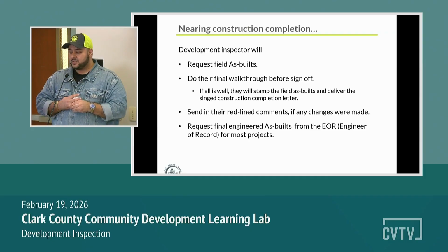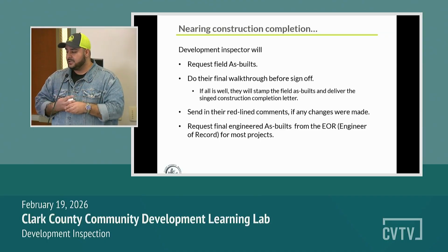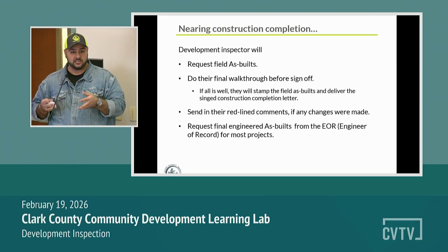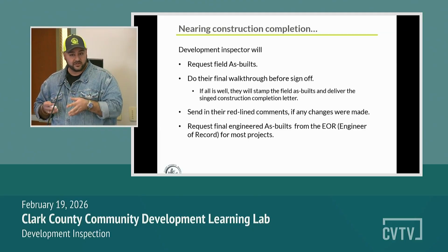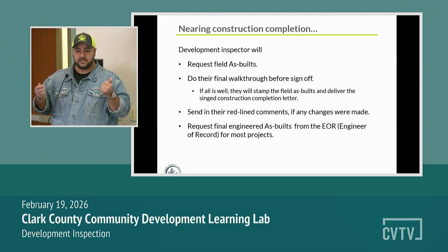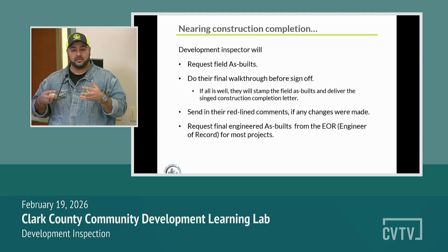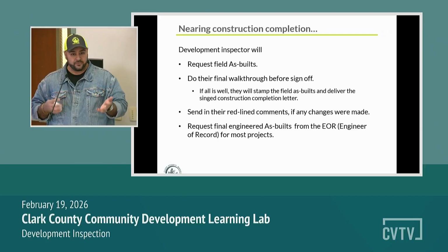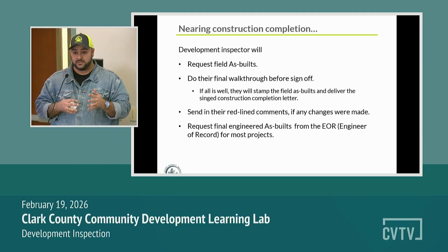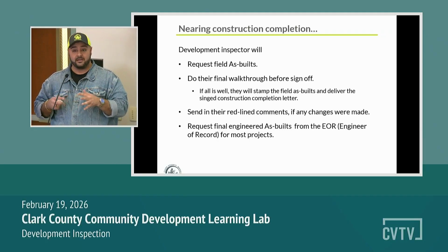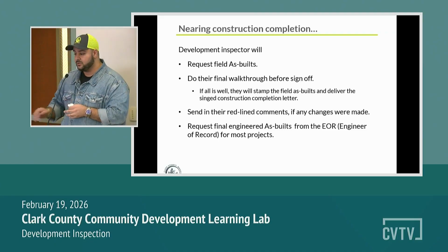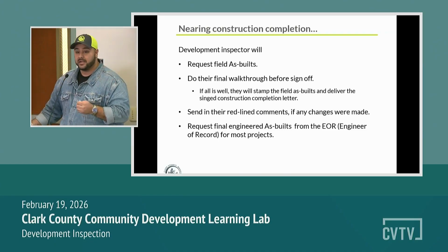And then once we receive that and all the notes, I'm actually going to request a final set from the engineer of record to be uploaded to our PD system, which is our project doc system. It's where our reviews are done for all of our engineers. So we have the prelim set, everything that we have done. We'll have the walkthrough where our inspectors will actually walk out, check everything, sign off, saying construction's been good. And then we're going to require a final set after that to be submitted for actual approval and review, to be blessed, if you will, by our internal engineer.